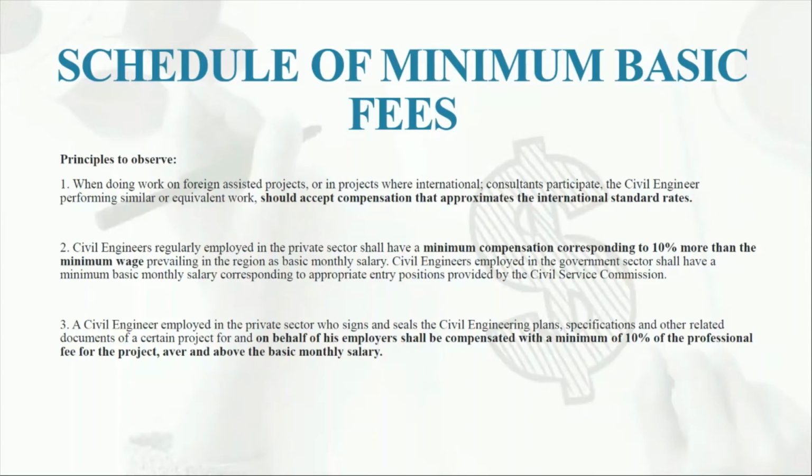So first, when doing work on foreign assisted projects or in projects where international consultants participate, the civil engineer performing similar or equivalent work should accept compensation that approximates the international standard rates.